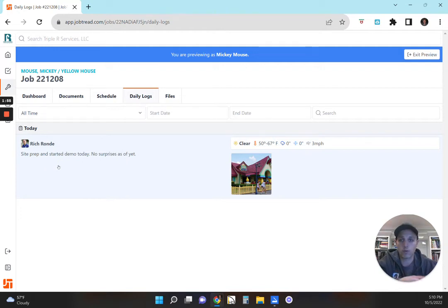We share that with the homeowner, so it's seen on both sides. The homeowner can comment on it. If there's something that is going great, you can comment on that. If there's something that you're not expecting or anything of that, you can comment that. You can make a phone call. But these going out every day has been a really neat addition, a really welcomed addition. And then we include some pictures if it's necessary, if there's some progress that we want to show you. And then also just for informational purposes, it just shows the local weather, what's going on there. So if we have site delays for whatever reason and we weren't sure, looking back, okay, well, it was 10 degrees and snowing, so we didn't make it there that day.